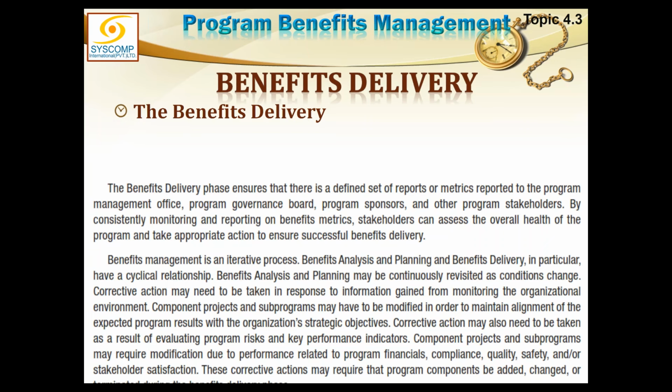So I can go back from benefit delivery all the way to the program benefit analysis and reanalyze the situation, get a change requested, and ultimately start doing it again. Benefit analysis and planning may be continuously revisited as conditions change. Whenever there is an internal or external change, whenever there is a change request, the planning and analysis have to be redone or at least tweaked.